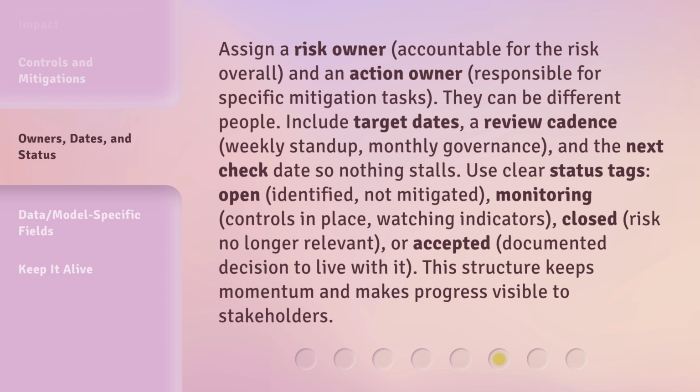Use clear status tags: open, identified, not mitigated; monitoring, controls in place, watching indicators; closed, risk no longer relevant; or accepted, documented decision to live with it. This structure keeps momentum and makes progress visible to stakeholders.